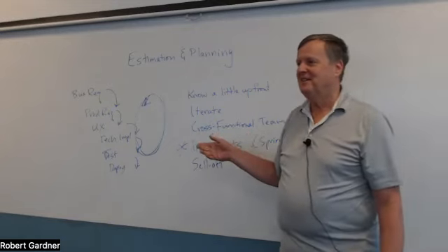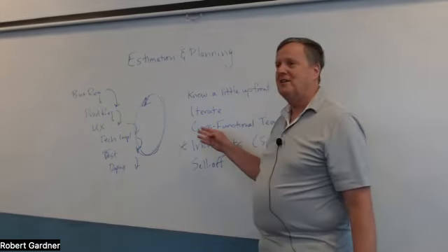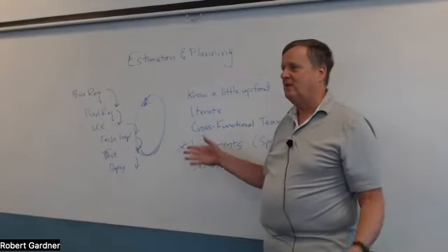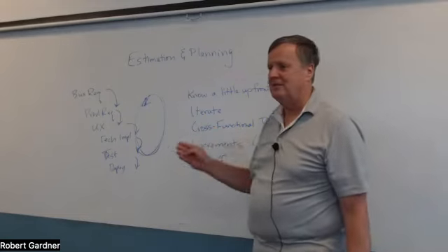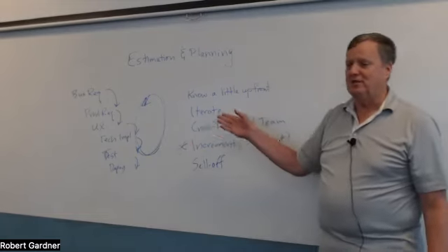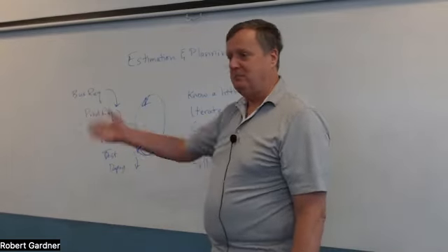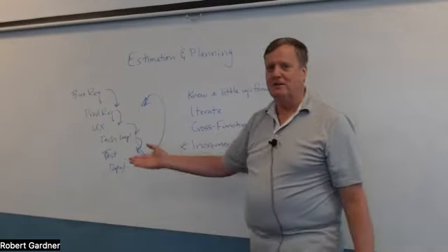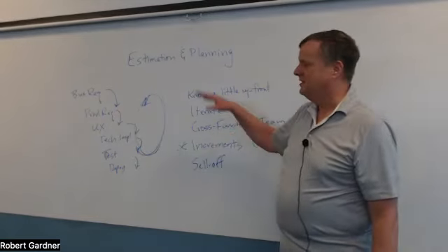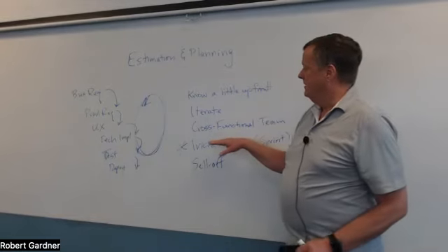Yeah, we don't know how well we work together, how much communication we're going to have. Even if we've been working together for a long time, we don't really know all that. Competing projects, exactly. Distractions, I'd call that. And it's not just competing projects, but it's meetings. How much of my time am I going to spend on meetings? And we fail to account for all of that. And so when we come in to do this estimation, we get it wrong. It's very, very hard to estimate.